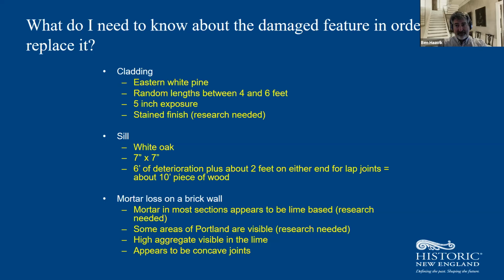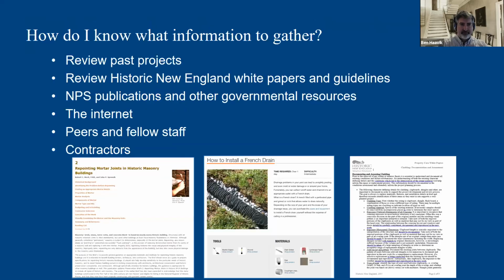You should verify that while you're on site, but we think it's about 10 feet. So when you give me the price for this project, that's kind of the parameter that we're working under, and we're all talking the same language.